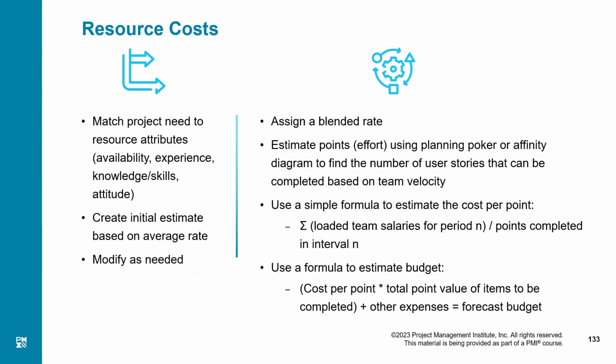We keep picking them until we reach approximately closer to the 700 story points, which we assumed is the capacity the team has to accomplish during one iteration. Got it? So I have picked, say, around 8 different user stories from there, which are approximately 700 story points. Got it? Once we have done that, now I have a very fair idea.